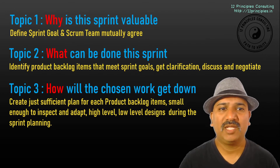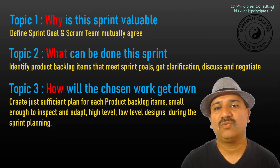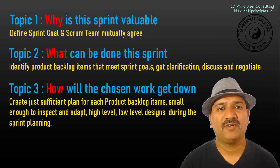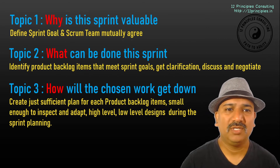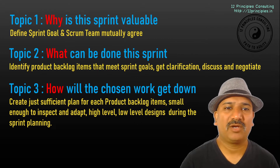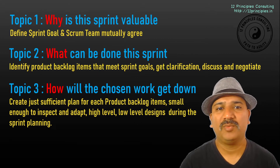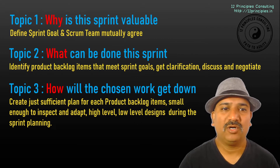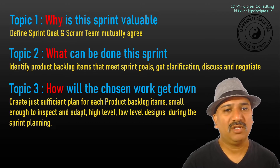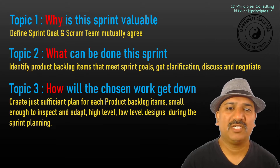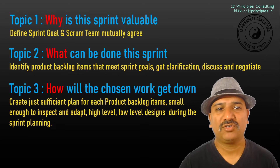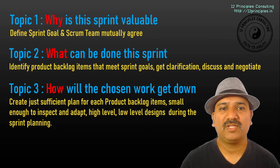In topic three, the team members talk about how will the chosen work get done. In topic two, the team members have picked up a couple of Product Backlog items. In topic three, they talk about how those Product Backlog items will be completed. They create just a sufficient plan for each item — small enough to inspect and adapt — covering high-level designs, low-level designs, collaboration, and definition of done required towards achieving the goals.